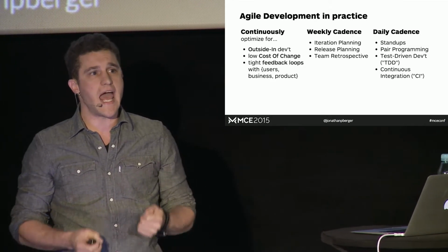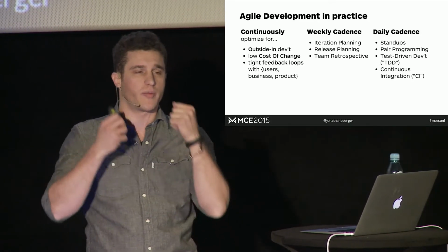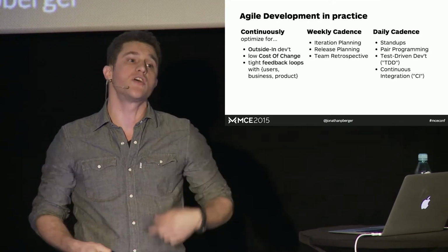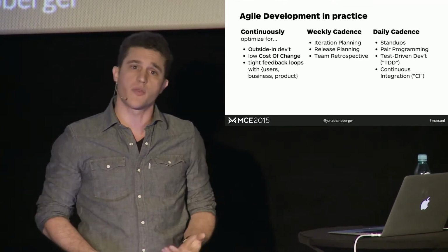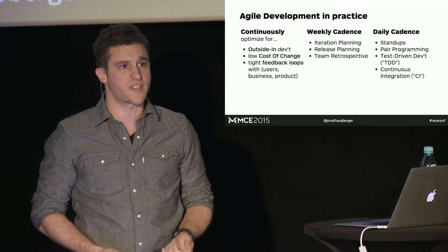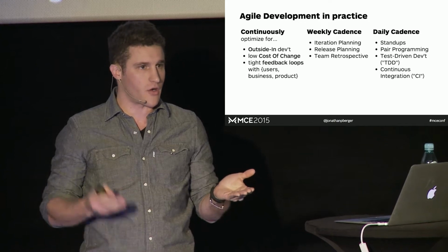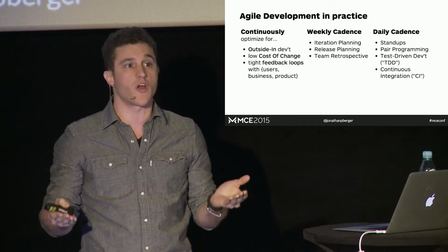That's Waterfall. And in order for Waterfall to be effective, you need to be predictable. You need to know when you're going to be able to hand off your designs to the engineers so that you can schedule everybody. But that's not the world we live in. We live in a world of digital product. We're building with bits and not atoms. And the fundamental difference is that the cost of planning and the cost of building, order magnitude-wise, are the same.